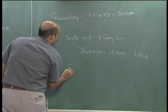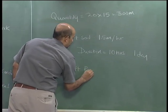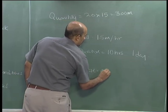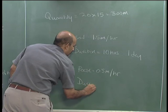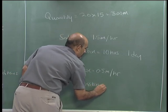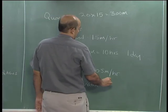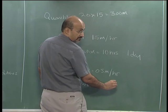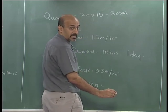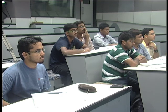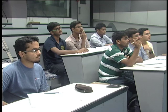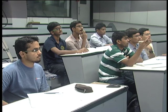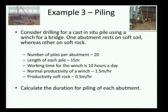For soft rock, the productivity is 0.5 meters per hour, which brings the duration to around 60 days. There are 20 piles on each abutment — so there will be two different timings. Duration for the soft soil side is 20 days, and duration for soft rock, working 10 hours a day, is 60 days.